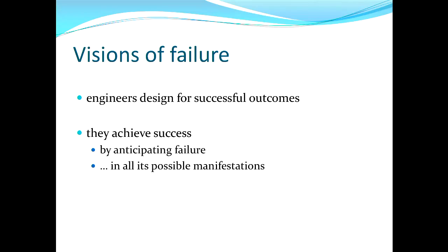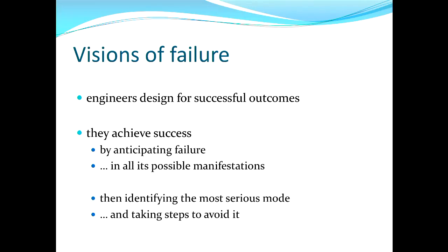We anticipate failure in all its possible manifestations, so we need to be creative and exhaustive in considering everything that could possibly go wrong. And then we need to identify what's the most serious of those possible modes of failure, and we take steps to avoid that. We're probably designing against several modes of failure, but in particular the governing mode of failure.